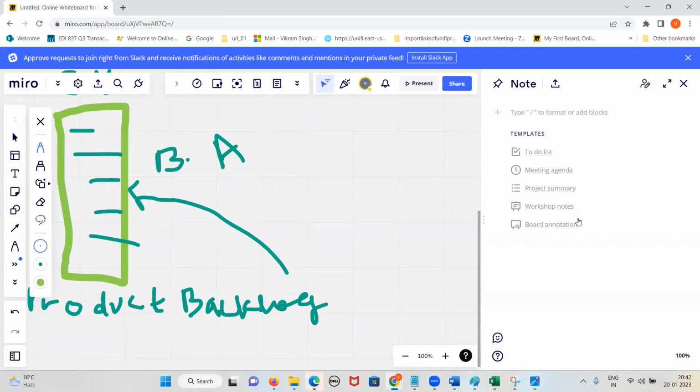it is put into a place called the sprint backlog. This is called what, guys? Sprint backlog. It is brought here, and then it is put in a set out of all this. Suppose there are 100 requirements. Out of that, we have taken 4 requirements. This is called what, guys? Sprint backlog. These 4 requirements are called the sprint backlog.